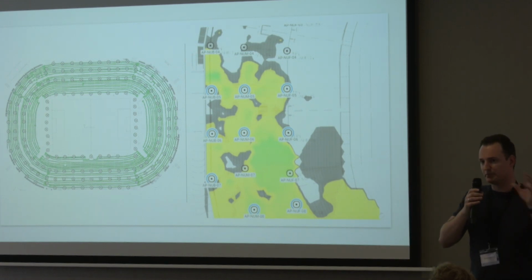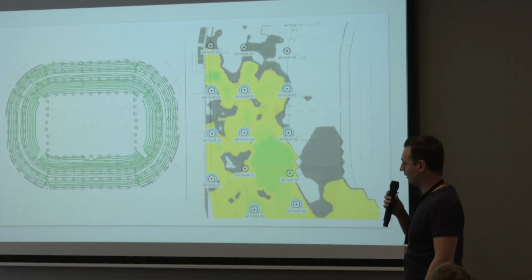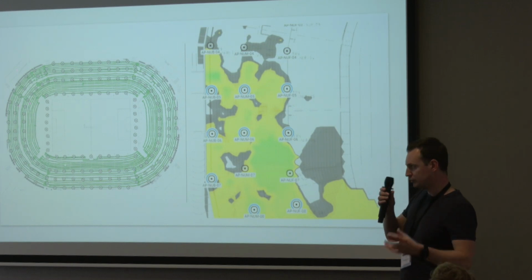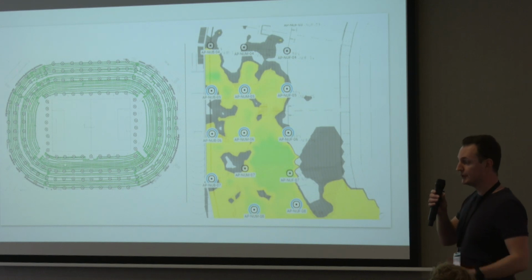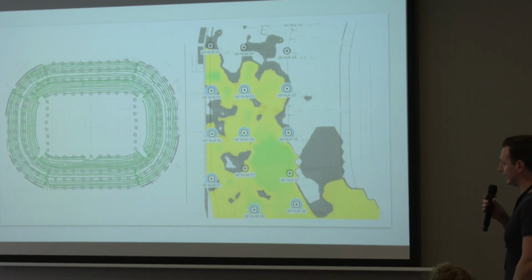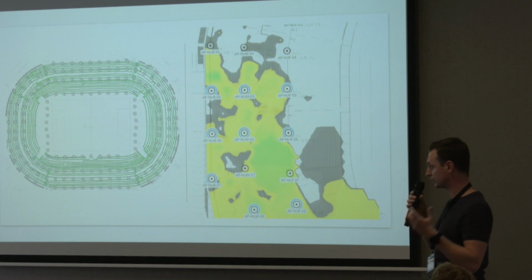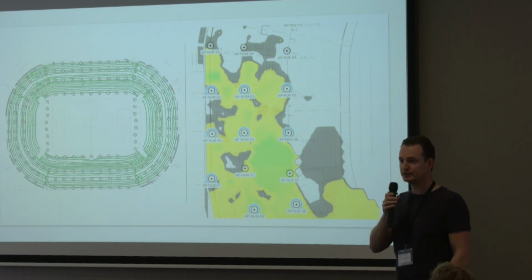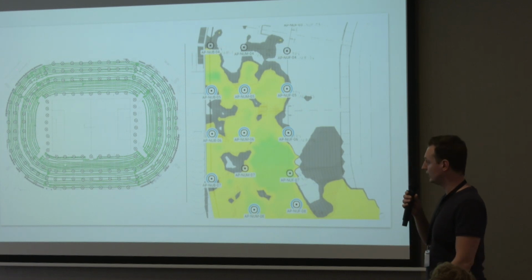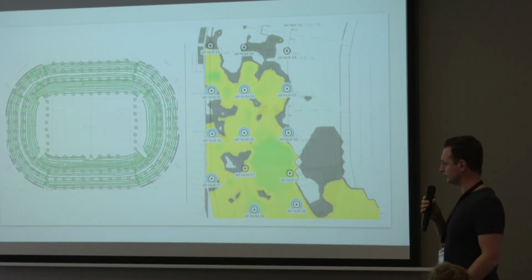You already get to a bunch of problems where you have to redesign it. So we try to turn it around and see if we can learn from the old situation and use that as lessons learned for the new design. It also helps a lot in the cost for the customer, because if we can reuse existing mounting positions where the cable is already there, it will save them a lot of cost.